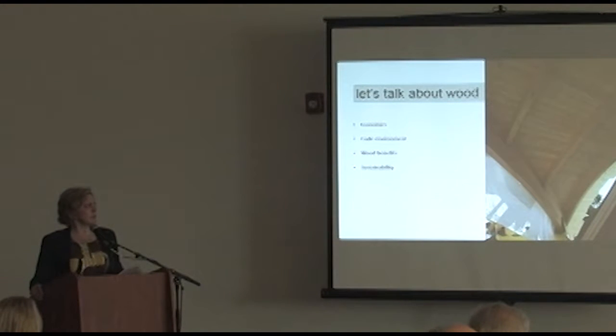And the folks from the steel fabricator said, well, if we just put a box on top of it, like Walmart, it'll cost us double any of the wood prices that these folks have given us. So we're not talking about competitive, we are talking about half the cost. But it took the scheme at risk, actually showing the numbers to the owner, for us to get past that and proceed. They all loved the idea and had a very hard time accepting that this was better than competitive. So that's one of the biggest obstacles we had to overcome.